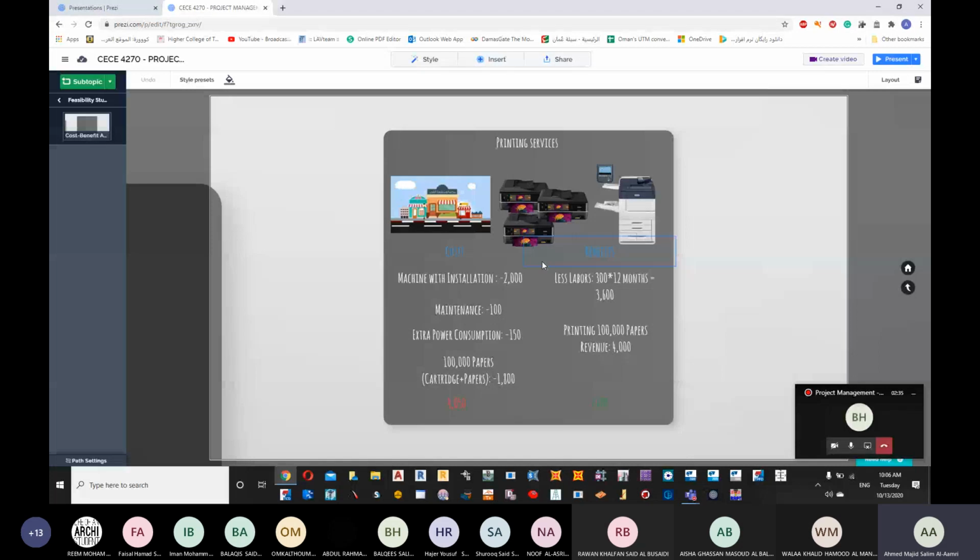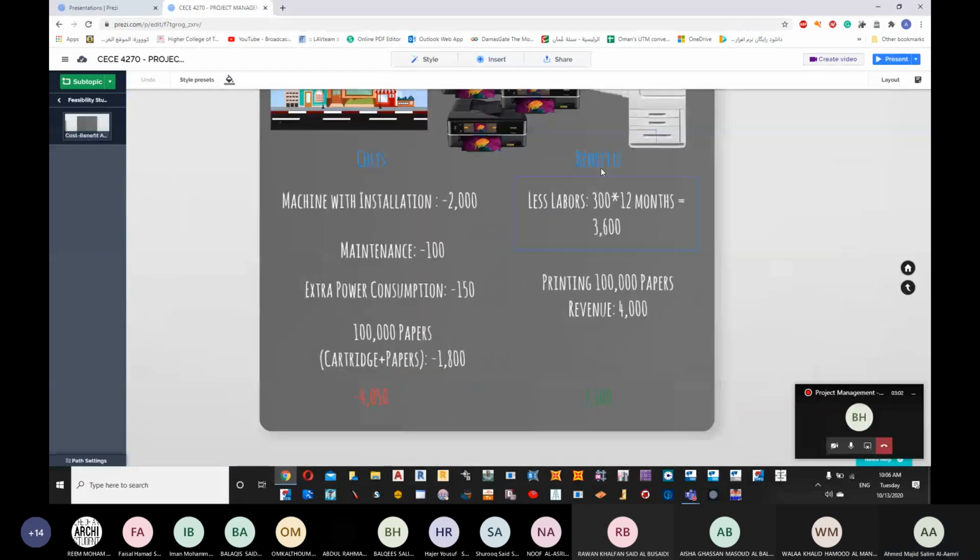So we can either compare directly, or we can get something called the benefit to cost ratio. Either we compare directly the values, which is bigger or higher. So 7,600 is more than 4,050 riyals, so benefits are more. Or another method of assessing that is to take the benefit to cost ratio, so dividing the benefit by the cost.